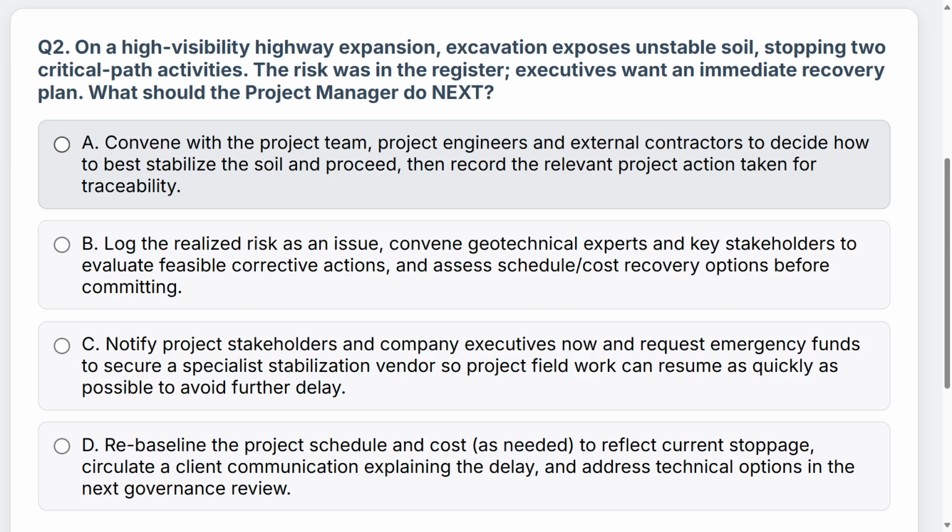Let's take a look at A. Convene with the project team, project engineers, and external contractors to decide how to best stabilize the soil and then proceed. Record the relevant project action taken for traceability. Now, while stabilizing the soil is not a bad thing to do, you are prescribing how to best stabilize the soil without really identifying other factors involved.